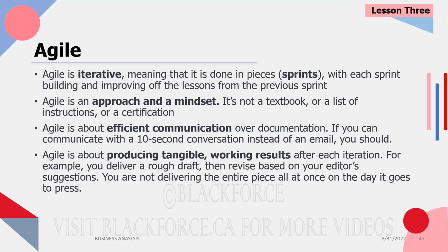We're going to say in these 2 weeks, we're going to build this one layer cake. We're going to present it to the customer and we're going to get feedback. Okay, you see that I use the word sprint in here. Sprint is one of the terminologies they use in an agile environment. A sprint is a time frame during which the team is going to build a selected number of user stories. Like I said, a sprint will go anywhere from 2 weeks to 4 weeks. For that sprint, before day one of the sprint, as a team, we're going to decide on how many user stories we want to implement in that sprint. Okay?